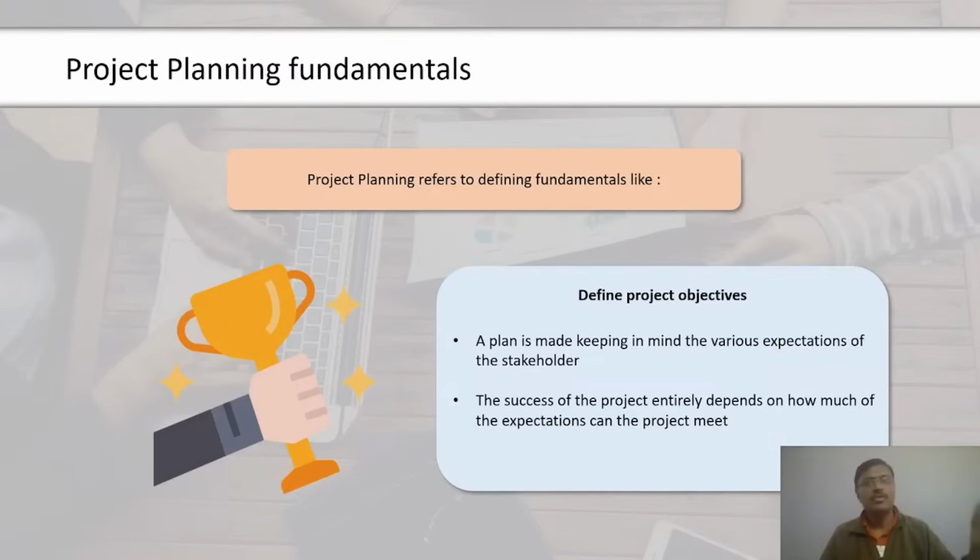In addition, the 7 basic quality tools, also known as the 7 QC tools, are used to determine the plan to achieve the desired level of quality. Statistical sampling as a tool becomes relevant when a quality plan cannot be applied to all the artifacts produced. For example, if destructive testing is a requirement, it can be carried out only on a sample, not on the entire population. Statistical sampling helps in arriving at a representative sample that can give useful information.